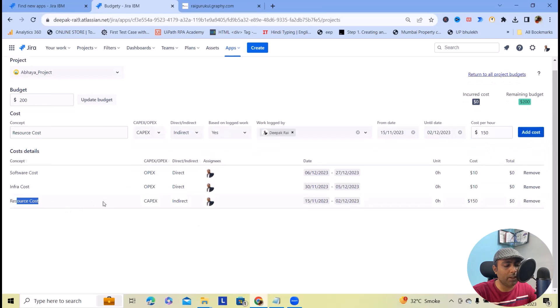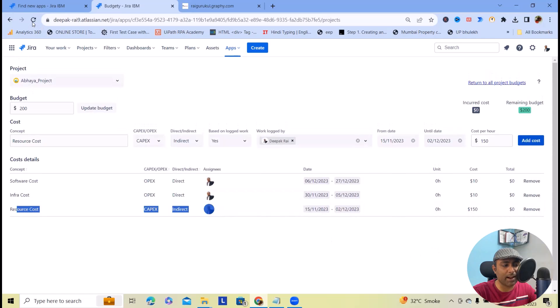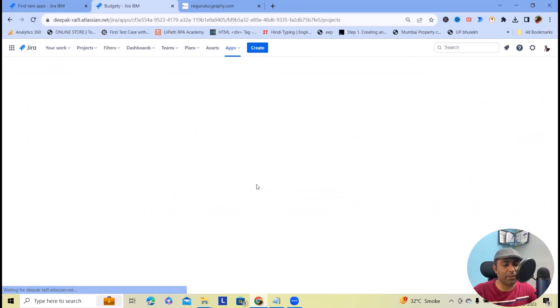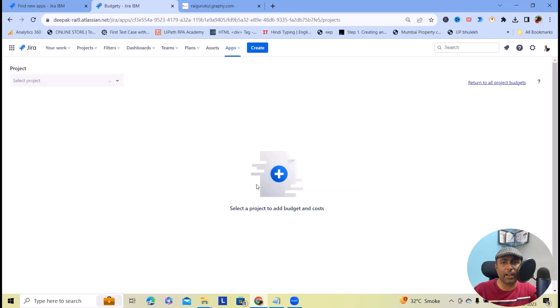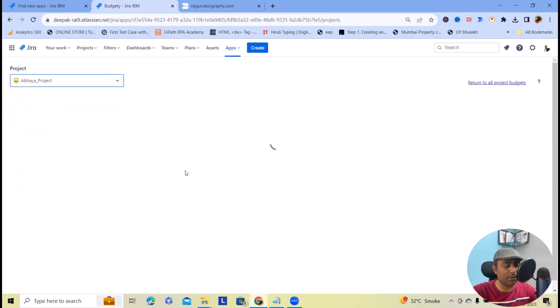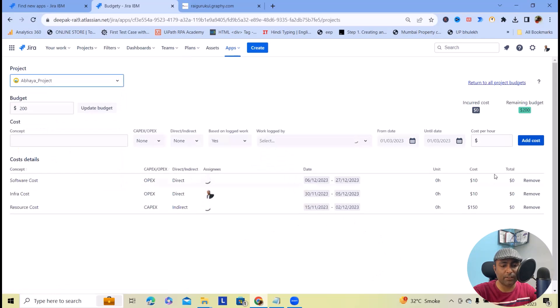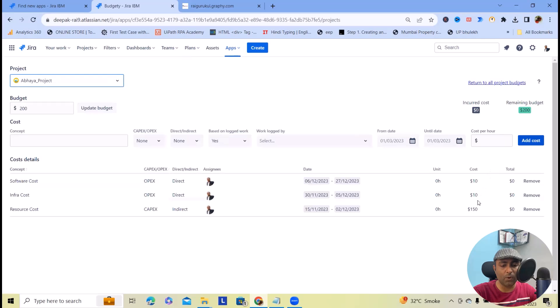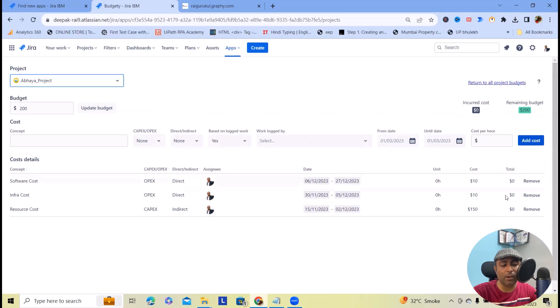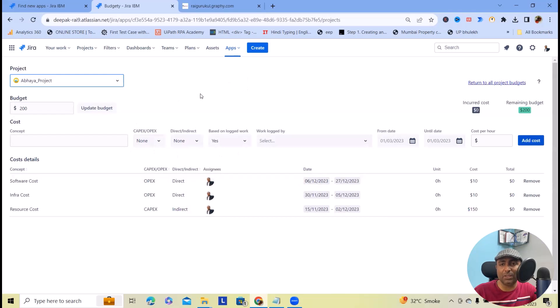This resource cost has been added successfully. Let me refresh this page and you will see the results. We have added the respective costs. Once we utilize them, we will get the total remaining budget, how much we have incurred, and the total we have used. This is how we can add budgeting to any project.